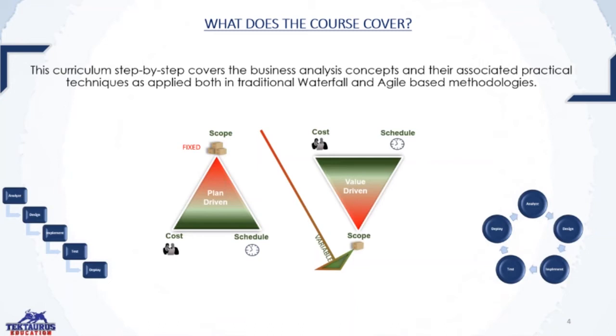So we don't have an end target in mind, let's say a year and a half or 2-year project or end goal clearly defined. It is a little bit uncertain. There is more risk. But then the small deliverables that we have are production ready. Those pieces of functionality that we add every month are usable components of work that our users can actually drive value from. They're value driven, meaning we are generating business value with every release.